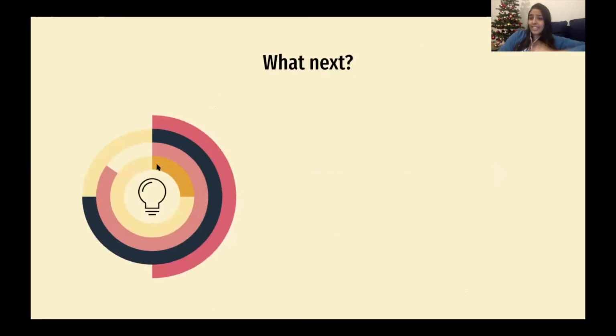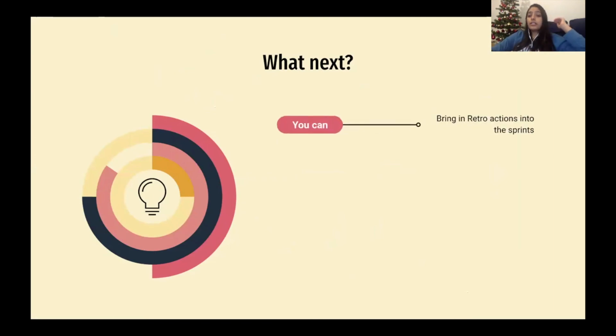Now, what next, right? I spoke about so much, but all of this involves, of course, yourself, but also involves some discussions with your team, which might take some time. But what are the steps you can do starting now? Starting now, you can bring retro action items into your sprint. This could be just the basic first step, when you treat those retrospective action items as important as you would treat any other sprint ticket.